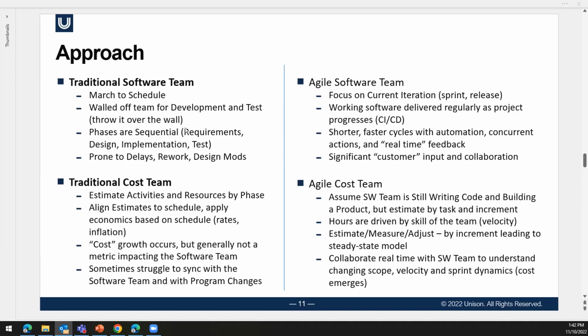I've always contended, and I think I've seen evidence that a team that stays cohesive over one or two cycles becomes predictable by about the third or fourth one. And if all we get is maybe 3 or 4 predictable iterations at a time, that's better than everything being random upon random. Absolutely. I agree with you. Definitely.